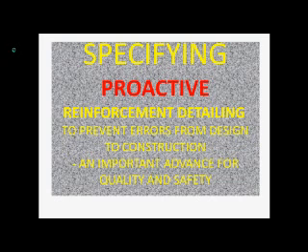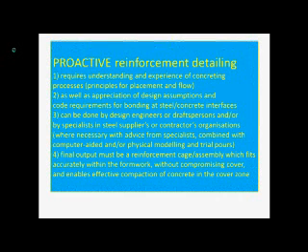What I call proactive reinforcement detailing is when the designer takes the initiative by thinking about potential construction problems and then tries to minimise them by appropriate detailing of the reinforcement. However, even if the designer has built in some avoidable construction problems, there is still an opportunity for the constructor to be proactive by studying the drawings well in advance of construction so that he can have any unsatisfactory details changed by the designer before any bars are cut and bent. This presentation is intended to help inexperienced designers to think construction and to encourage them to become good reinforcement detailers.